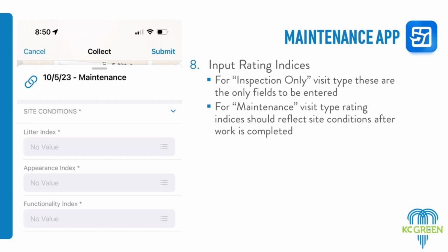Like if we're using the campus, for example, we've got a retention basin out front here, and we've got bioswales around the site. Those are all their own individual site footprints, but you're recording it on the route, which puts that all together. So you're doing one inspection or one maintenance report as you complete a task for the whole site, not each of those individual footprints.